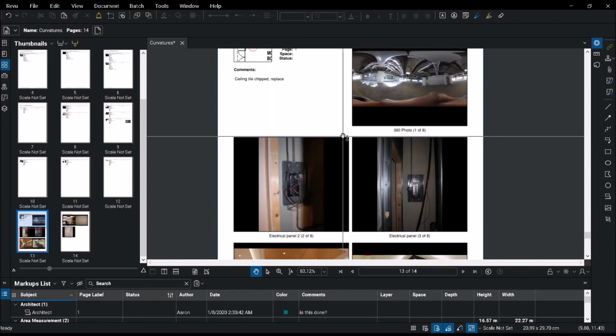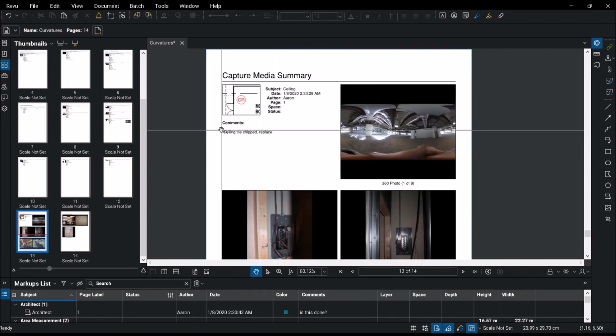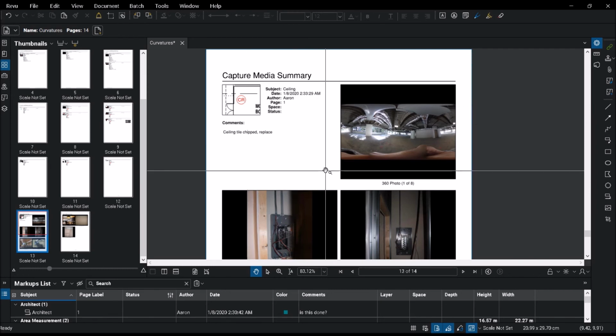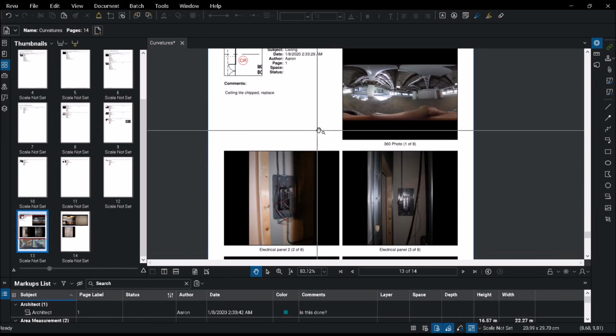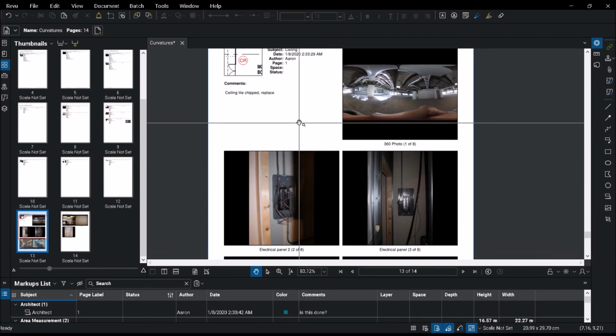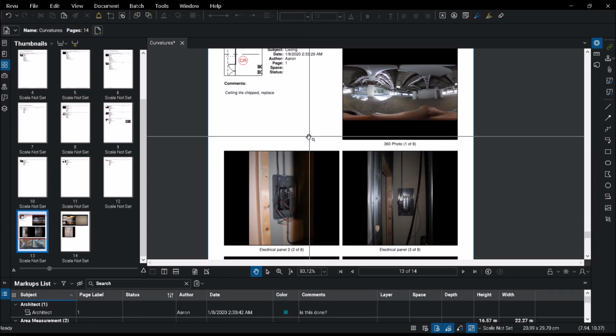This really helps you settle one of the most painful processes, whether you are a project manager doing a progress claim or a site walk. You take photos, and after you finish taking the photos, you don't even need to arrange or categorize them, because all these photos are already tagged to that particular room, to that particular markup where it is. I do not have to spend time wondering whether these five pictures belong to the room on the first story or the second story. So it really saves a lot of time. The same goes whether you are doing checks for defects.